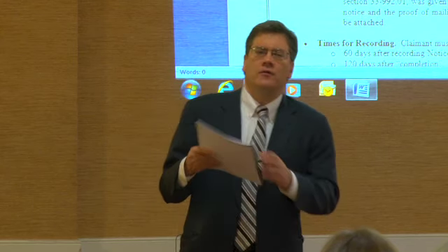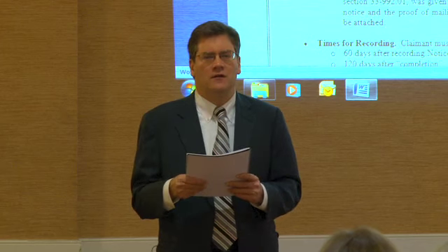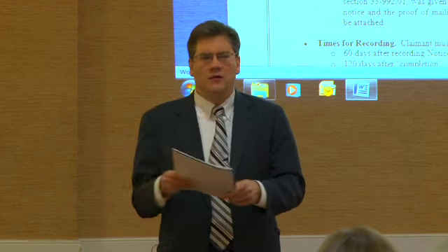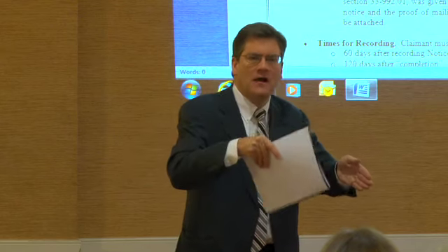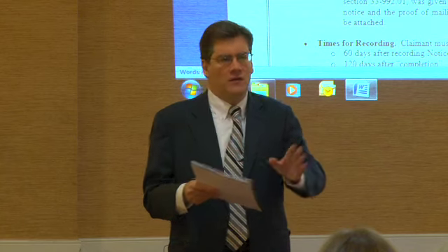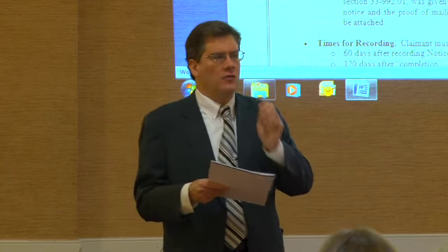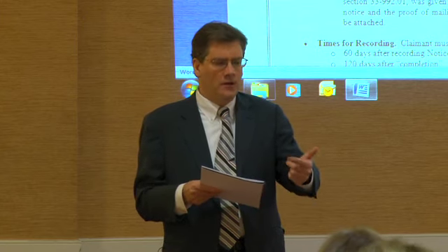Simple as that. Again, the appellate court has indicated that the practice is that you can either describe the contract in sufficient terms in the body of the lien claim or just append the written contract to it. But that's not what's happening in the courts. So, if you have a written credit application, it's got to be attached to the lien claim.